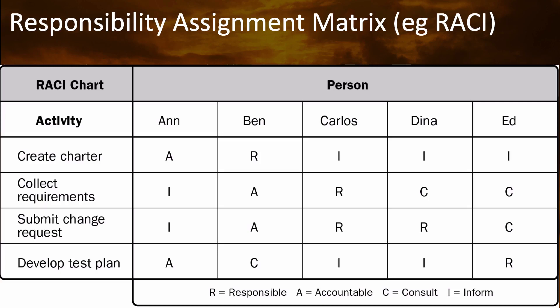You can have multiple people responsible, multiple people consulted, and multiple people informed on any one activity. A RACI chart like this is a simple but valuable tool in making sure that everyone understands their roles and responsibilities for completing different work packages or activities.